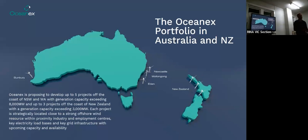So then private developers will put in bids for a patch of sea, up to 700 square kilometres, and that's your application for feasibility licence rights. Then you get your patch of sea, and you can do your feasibility study, start your front-end engineering design and work it through. But private developers are bidding on these lots. So South Gippsland, first cab off the rank, Hunter following very closely up in New South Wales off the coast of Newcastle.